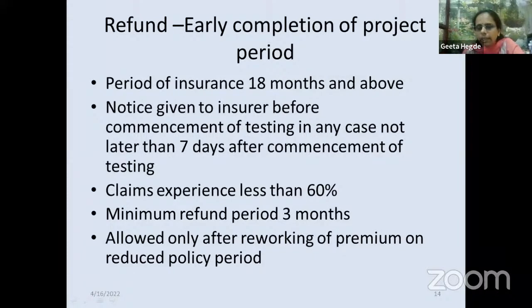And in any case, not later than 7 days after commencement of testing. Claim experience should be less than 60%. Minimum refund should be for 3 months. Allowed only after reworking of premium on the reduced policy period. So these conditions are important. First is period of insurance should be 18 months or more, and the refund claim should be minimum for 3 months, and the notice should be given before the testing starts, or at least maximum not later than 7 days after commencement of the testing.